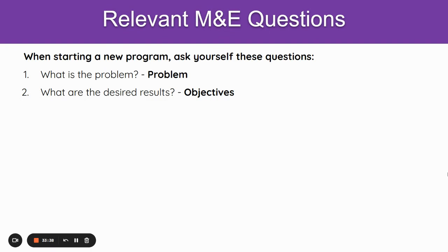And it is called the objective tree as well. Just as we have the problem tree, we also have the objective tree. The problem tree allows us to understand the causes and effects of a specific problem we have identified, while the objective tree transforms all these problems into actions or into future states, into better states, all right, into positive states instead of the negative state.